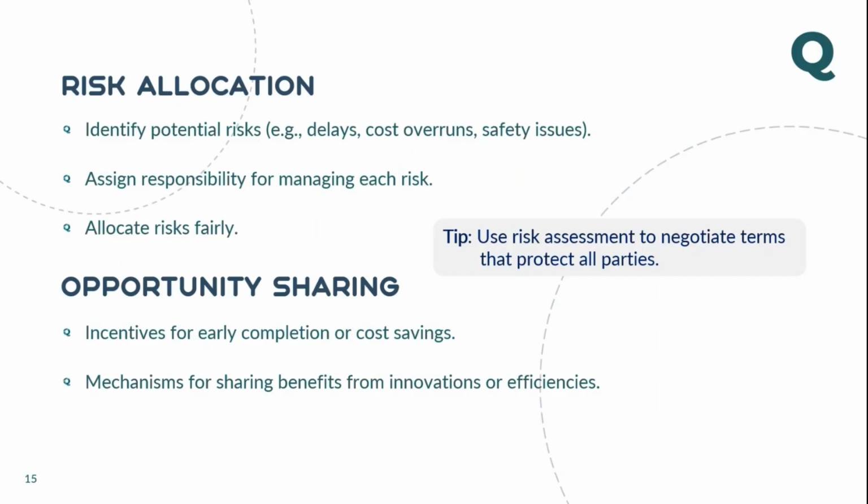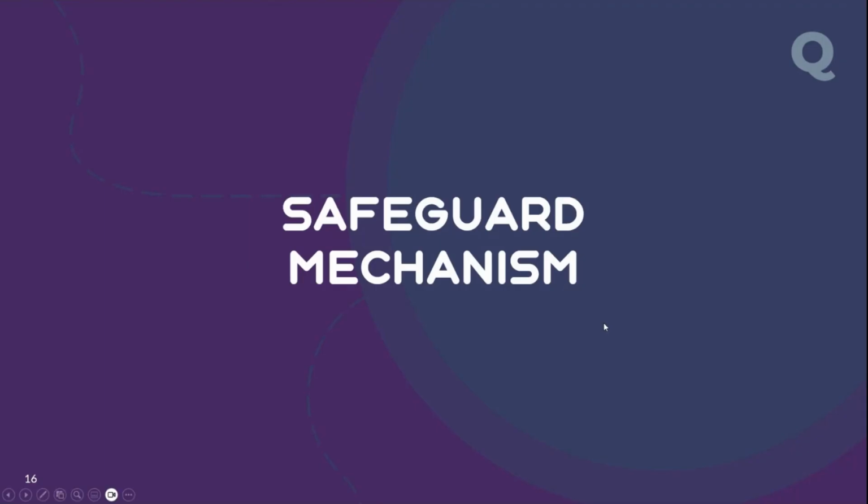Okay, let's see the next point which you have to look into when you are reviewing a contract. We start from the purpose of contract. You understand the purpose of contract. Second, you look into the principal items of contract. Then you look into sufficiency of the contract terms like payment mechanism, obligation of party, dispute resolution, insurances. Then you look into obligation of party. Once you identify the obligation of party, then you look into risks and opportunity.